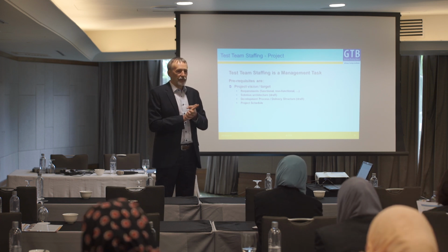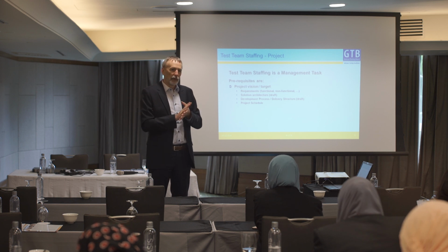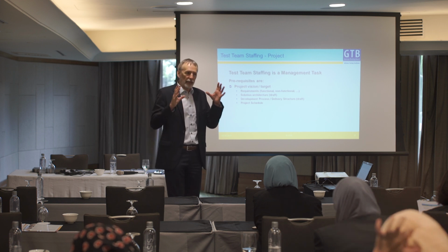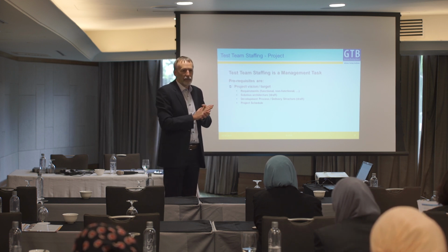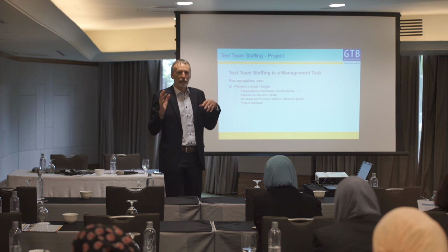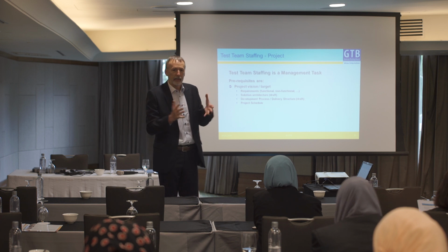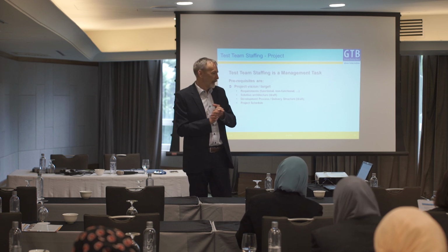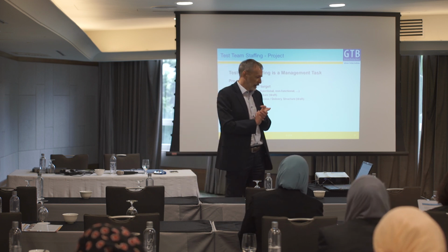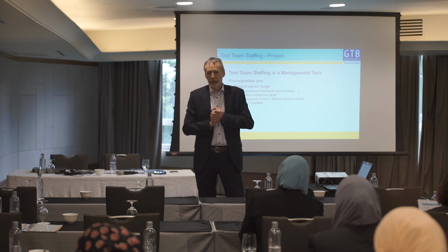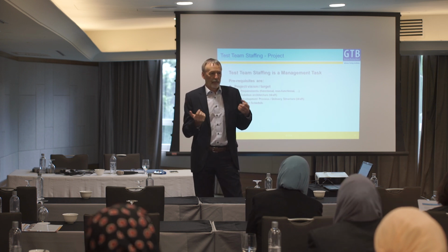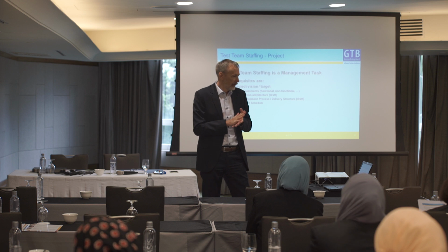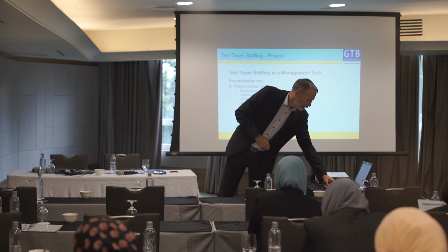You need an idea of how the solution will look and how it will be built. Is it an agile project, where you get a part of the solution stepwise, or a waterfall approach where we get a final solution at the end and then start testing? You have to think about the development process, the delivery structure, and the overall project schedule. Normally, these are prerequisites from the project itself, and then you can work on that.